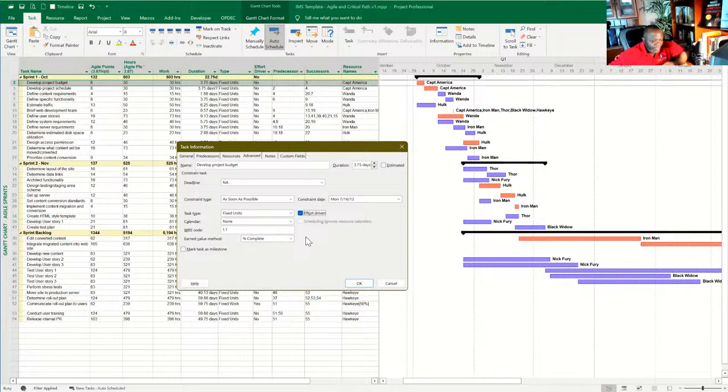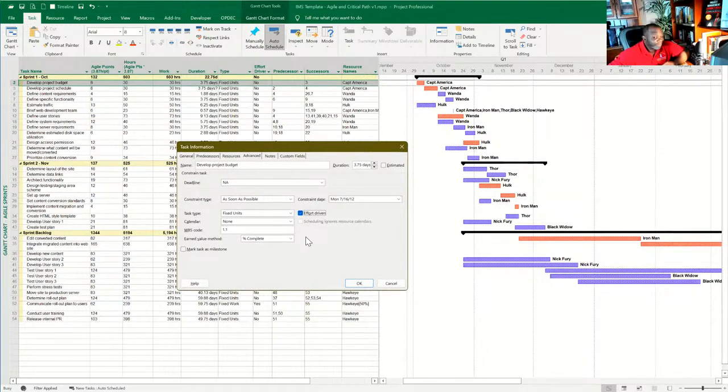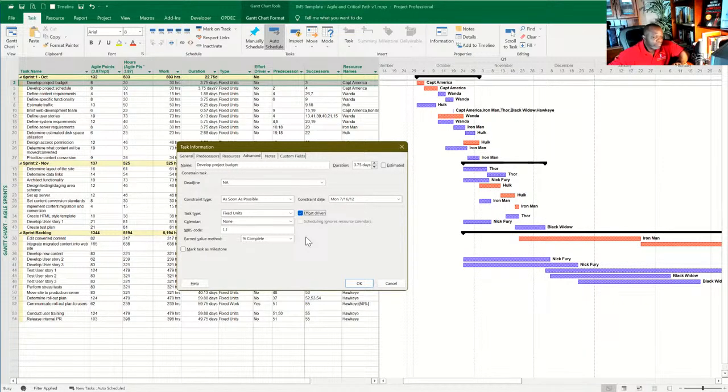So we've got resources in there, but they're not driving the schedule, huh? Correct. And politically speaking, that's the better approach, to avoid confusing things or having friction between you and your stakeholders. Because once you start digging down to resources, putting down actual names, it can be seen as arbitrarily added, and then that's a breach of the contract and the agreement. So sticking at that generic level is a safe spot for a scheduler.